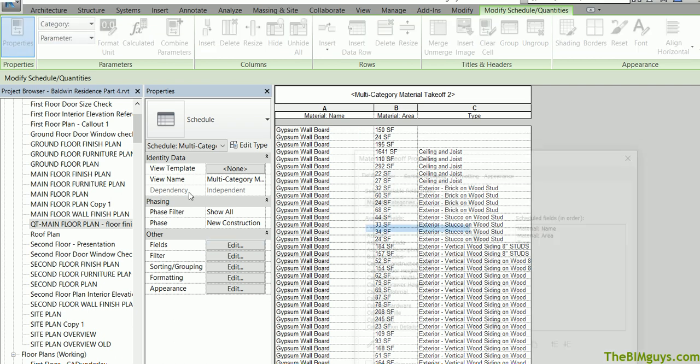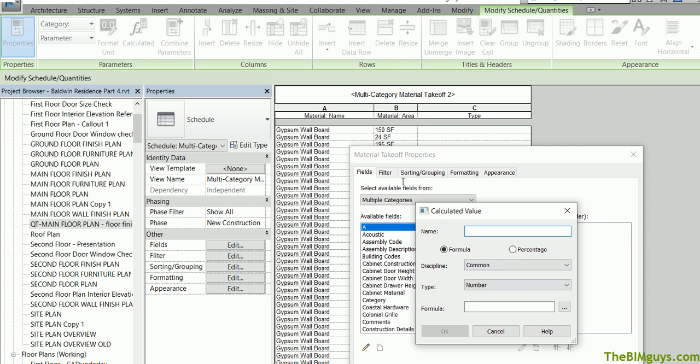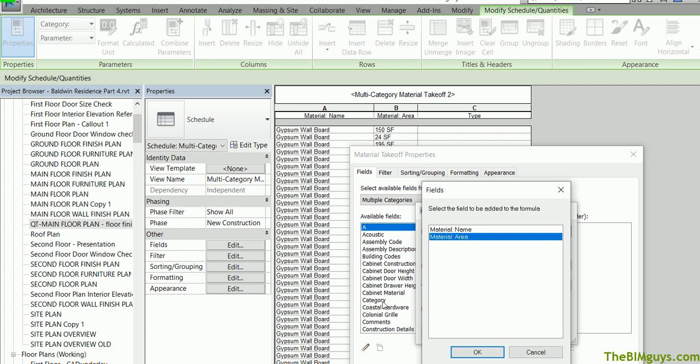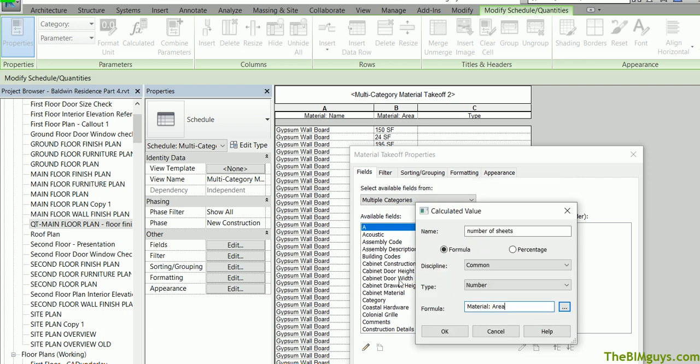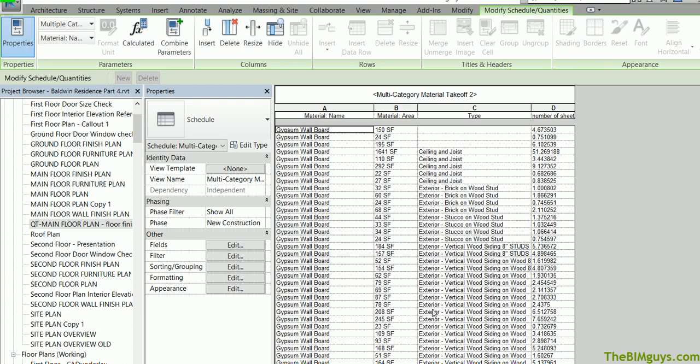I'll go back to my fields. And I'm going to add in a new calculated value. The calculated value is going to be number of sheets. OK, at this time, a common number. And we're going to actually take that we have the square footages here. So what I'm going to do is I have to calculate how many sheets will be here. So I'm 32 square feet. OK, now what that's going to do is that is going to give us a sheet. Now it's an 8 by 4 sheet. So 4 times 8 is 32. So I'm telling it to do that. Let's see what happens. We hit OK. I hit OK. And we add a new column. Notice it's giving us the sheets that we need.